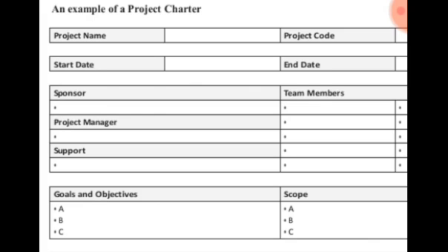Take, for instance, your project of building a house. The contractor who is in charge of laying the blocks and all that can tell you that, okay, for this building we are going to be needing 2,000 blocks, and these 2,000 blocks are going to cost about 100,000. Understand? The electrician will tell you that, okay, the wires and the piping we need for this building are going to cost close to 300,000. The carpenter will tell you as well. So with all those different estimates, you can then project how much the project is going to cost for your sponsor.